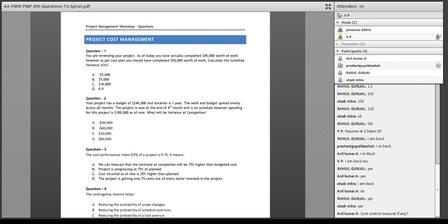So what does this mean? If you have to reduce the cost, you have to find more efficient ways and see that you can do the work with lower cost people, but on the condition that it will not delay the project. If you take low cost resources and it increases the project duration, ultimately it will come out the same or even poorer.